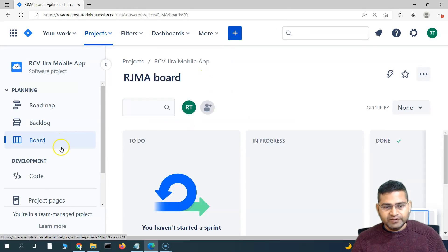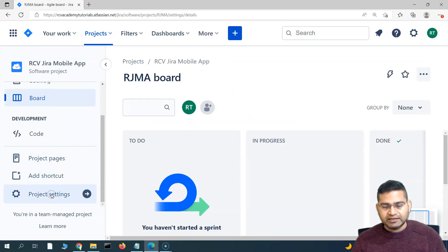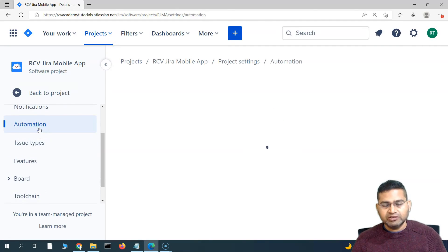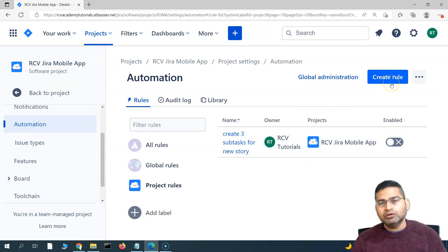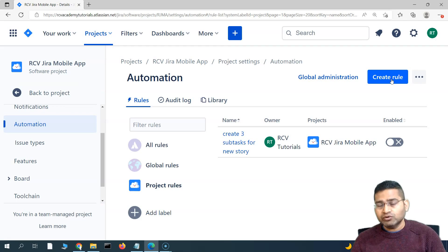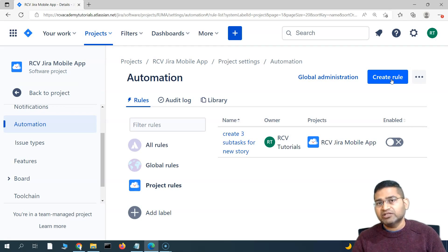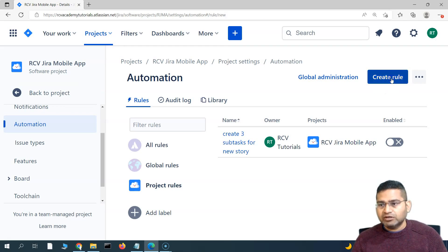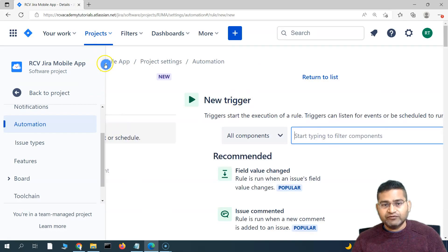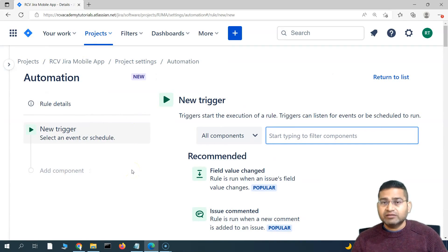Go to the project — this is the Jira Mobile App project we are working with — then go to Project Settings and then to the Automation section. Let's start creating a rule so that as soon as all the child issues within the epic are closed, the epic automatically gets closed. This is a highly used use case to maintain Jira hygiene, removing manual intervention for closing epics. Click on Create a Rule.